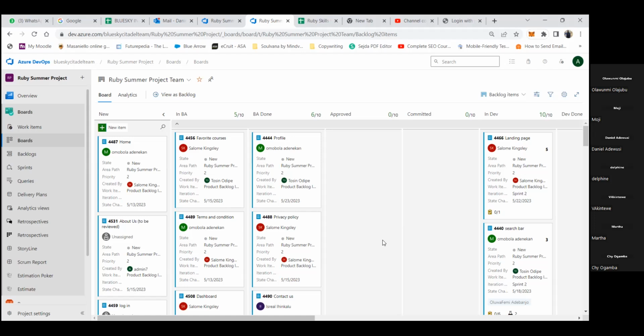Yeah, my exact question is who is supposed to estimate it? Only the QA, assuming it's only automation remaining. Yes, just the QA, because he's the one that has work to do on it. The developer doesn't have anything to do with automation.